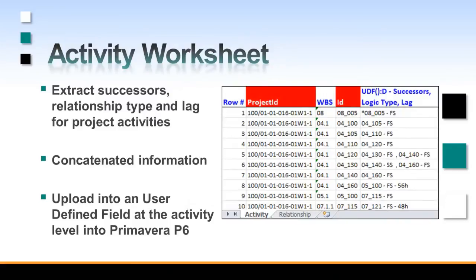In the following exercise, with the help of Emerald P6 Loader, we will be extracting information on activities. We will extract successor, relationship type, and lag. The next step will be to concatenate this information into one column, and then download it into an activity user-defined field that has already been created in Primavera for this workshop demonstration.